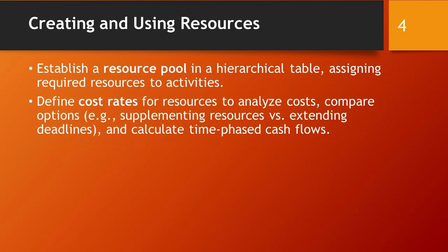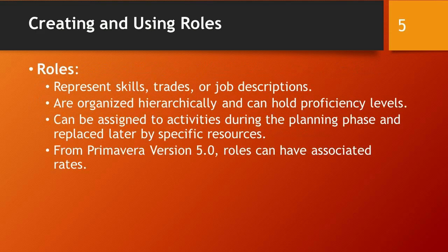Creating and using resources involves establishing a resource pool in a hierarchical table and assigning the required resources to activities. It's important to define cost rates for resources to analyze costs, compare options, such as supplementing resources versus extending deadlines, and calculate time-phased cash flows. Roles represent skills, trades, or job descriptions and are organized hierarchically, holding proficiency levels. They can be assigned to activities during the planning phase and replaced later by specific resources. From Primavera version 5.0, roles can have associated rates.